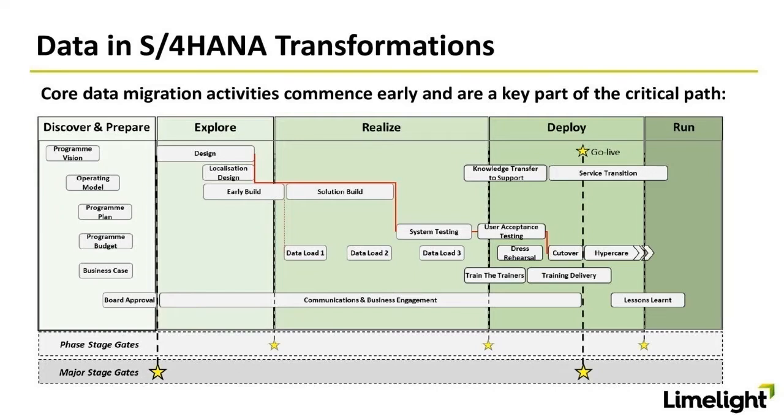So you may notice underneath the solution build, you actually start to get into these data load 1, data load 2. We might refer to these as mocks. These are test cycles for data migration. And a key thing to remember is we're actually testing data migration very early during the functional build of the solution of the system itself. So we're going to come back to that shortly. That is one of the key things to watch for.